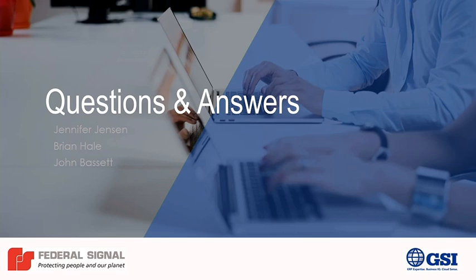Any more questions? So initially we didn't know, was data archiving part of the project? We thought we could have done it without it. So we started down the project saying, how do we archive and convince, especially the finance folks in our businesses, to move this data over here and trust that it's right. And we were pretty sure that trying to take on a data archiving project in this tight of a time frame would jeopardize the timeline.